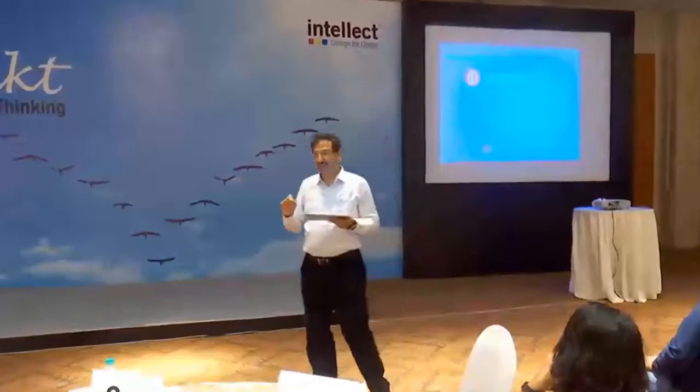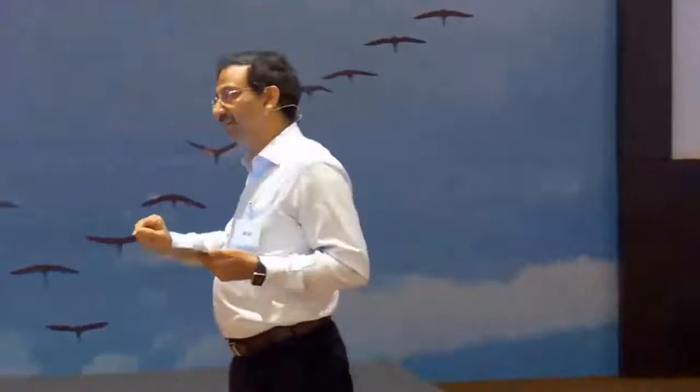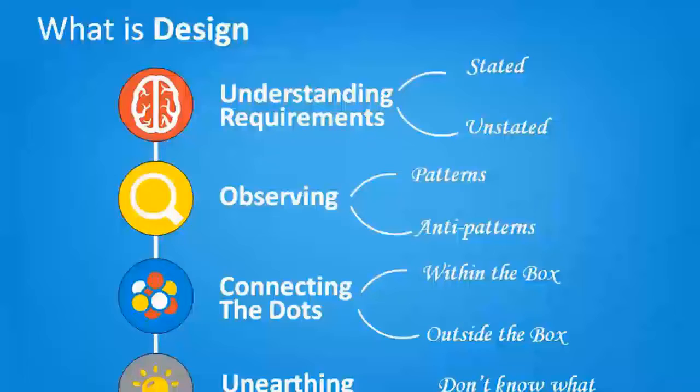Customer didn't change the requirement. When the customer saw a new technology which is delivered, as soon as he sees something new coming up on his screens, he says, oh, this is also possible. Now he says, if it is possible, why can't I change it? I can use it in this way. And my project manager says, my project got delayed because customer changed the requirement. The problem statement is not that the customer changed the requirement. The problem statement is we never spend time in understanding his unstated requirement and we never walk him through the journey, what is possible at the early stage of the project.